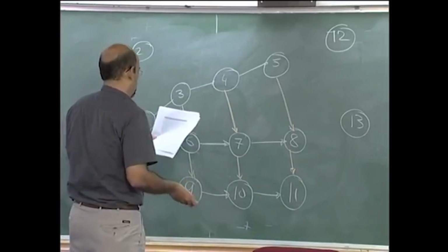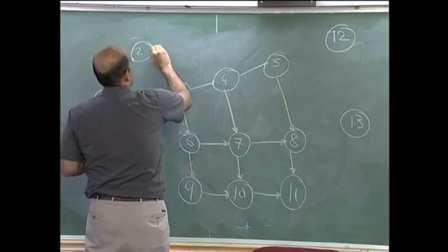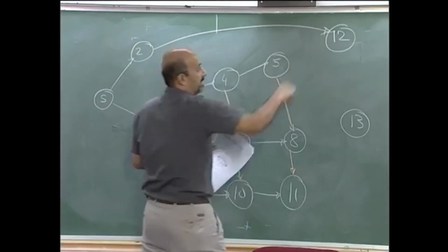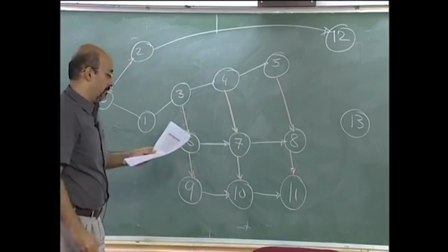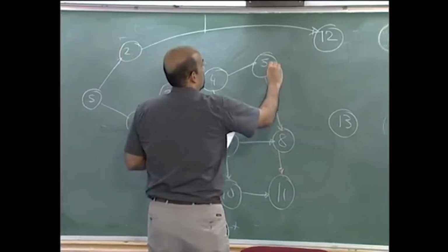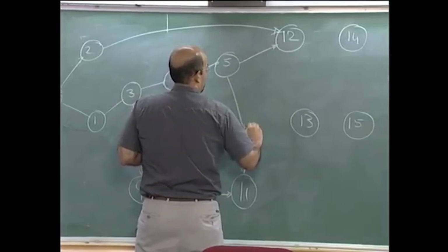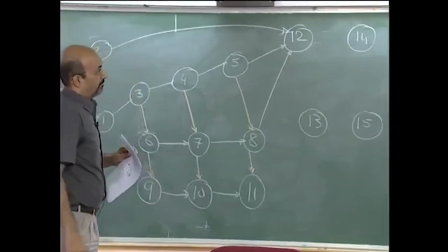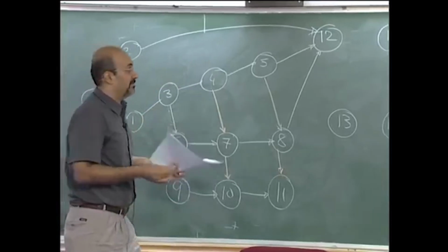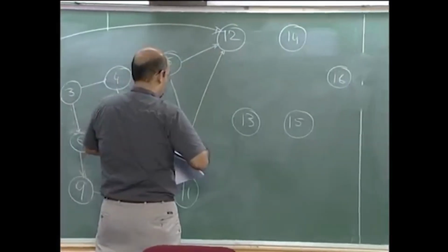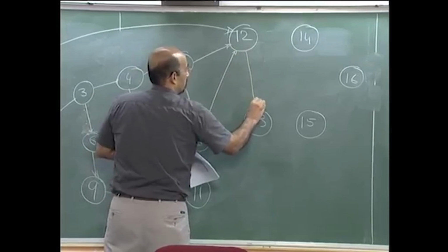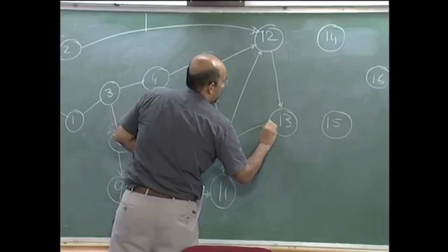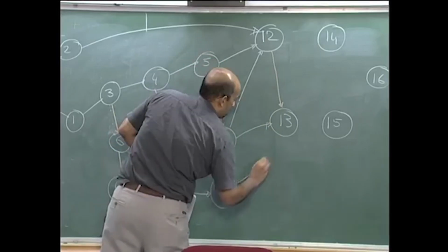My 2 and 12, this is the place beam on the east side. It requires 5 and 8. The crane that is going to be used there will be released, and only then will I be able to do 13, which is place beam on the west side, which is now 8 and 11.